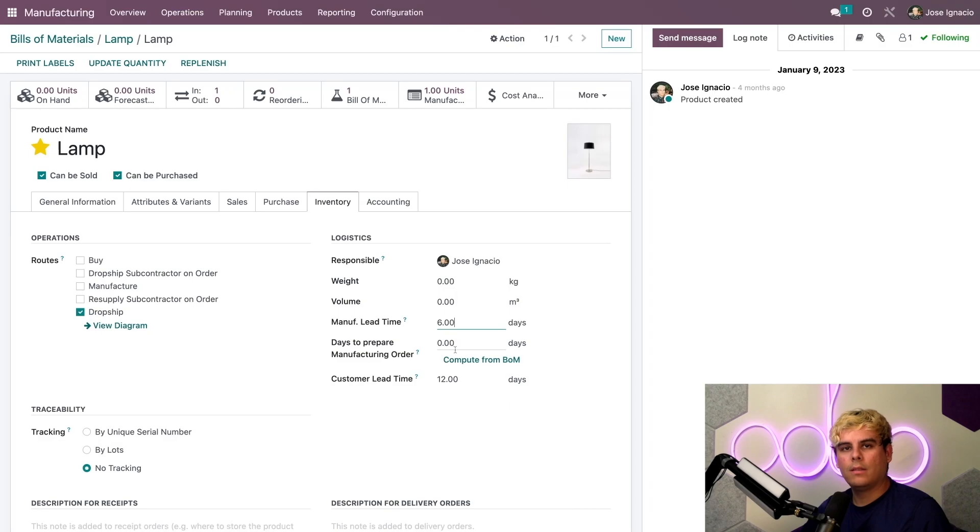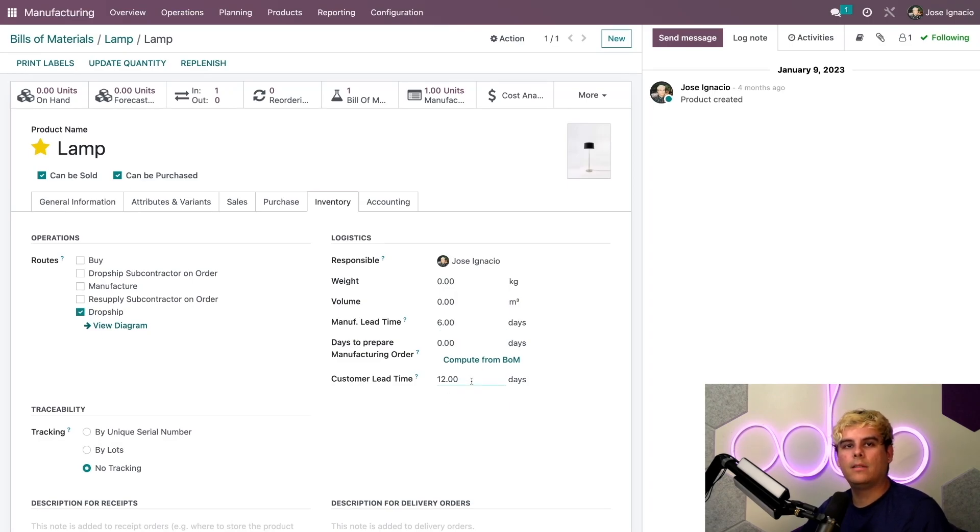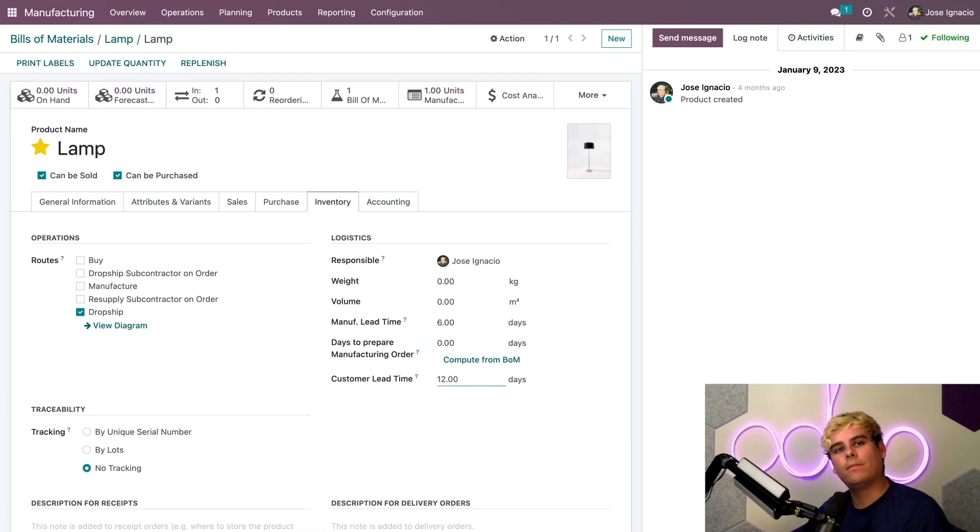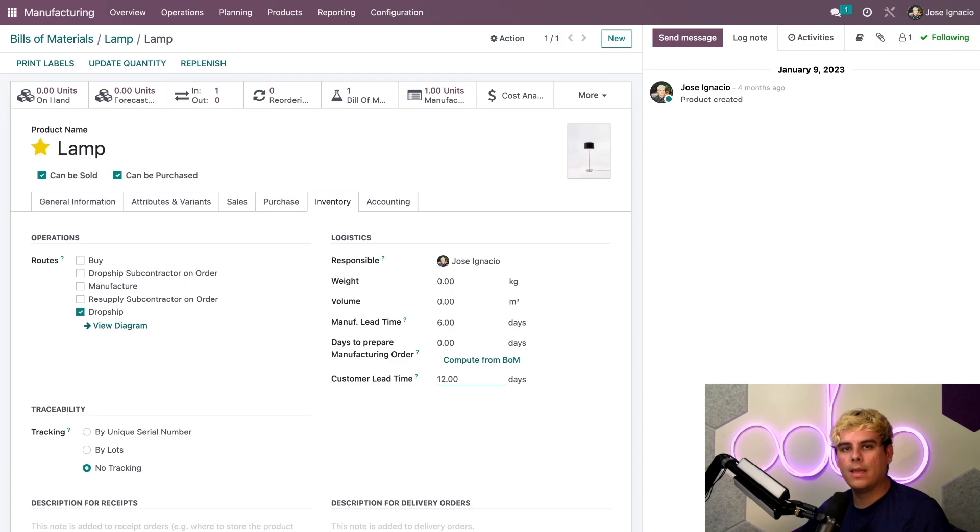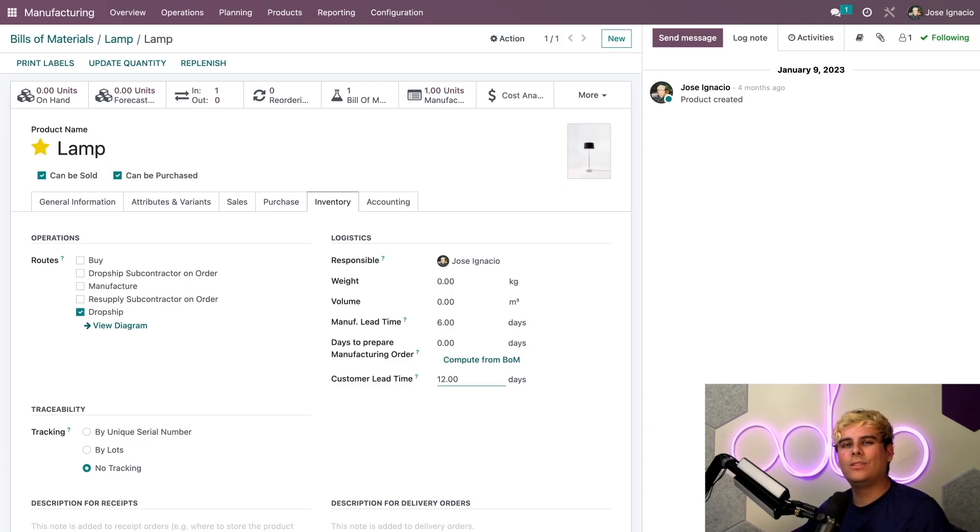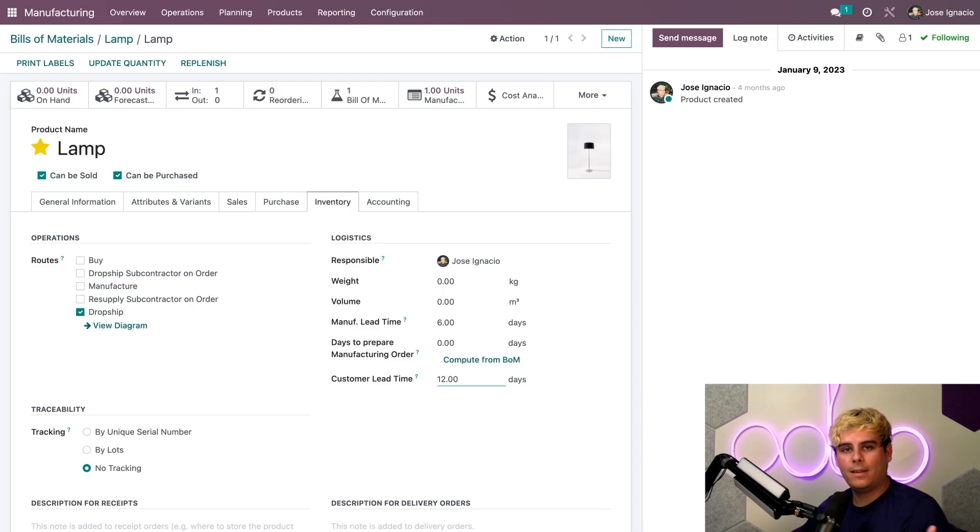The customer lead time itself is 12 days, and that is the number of days it takes for the customer to receive the product after they place the order. We know that it takes four days for the subcontractor to receive the components and six days to manufacture the lamp. We also know it will take an additional two days to ship the lamp to the customer. Added together by basic math, that's 12 days for the customer lead time.